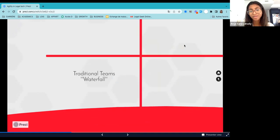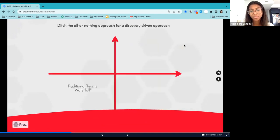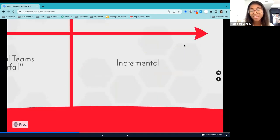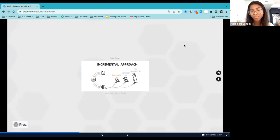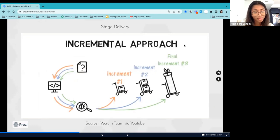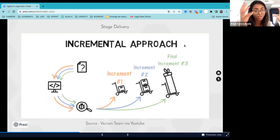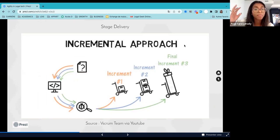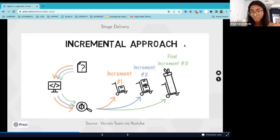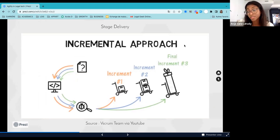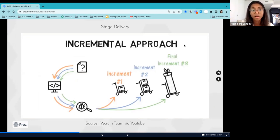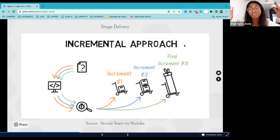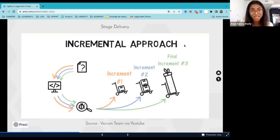And agile is kind of a mix between being incremental and being iterative. So it's kind of a continuum. So I will first of all cover what it means to be incremental. And if I would approach this same project with an incremental approach, I would have a stage delivery. So I would start out, I don't have some of the data or some of my requirements are not defined, I don't know them, I would design, code, test, and then build increments. So I would deliver maybe feature by feature, I would have a first delivery of that portal with feature to create or update corporations. And then I would have another delivery with other features that allows the lawyers to link it to the CRM or to the e-signature process. And that I would have my final delivery, which is the last increment with all of the features included. So that would be a stage delivery.